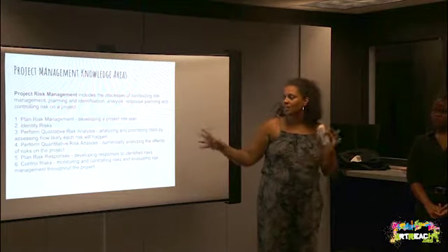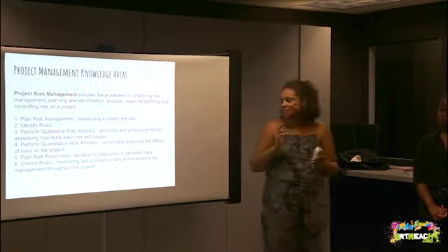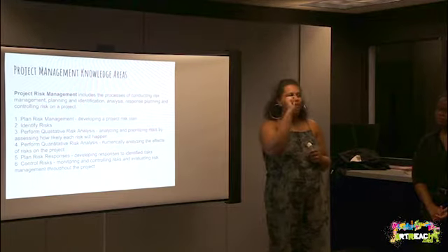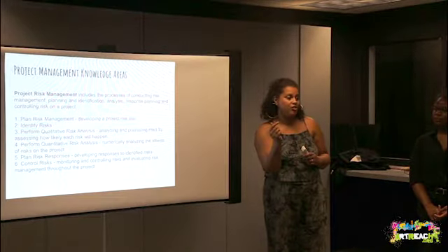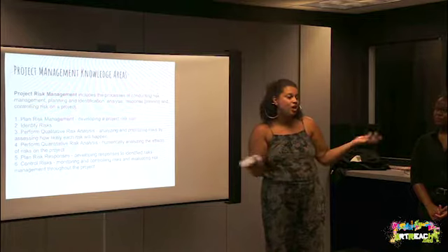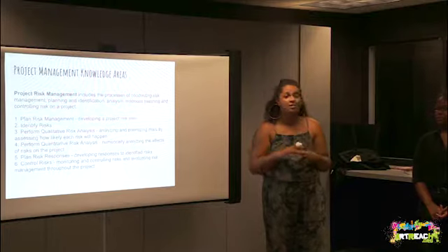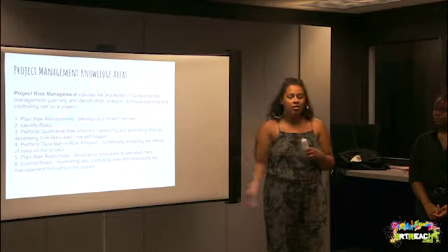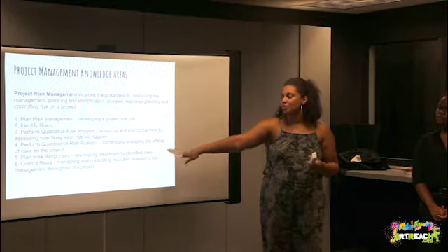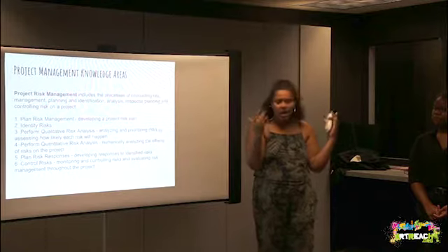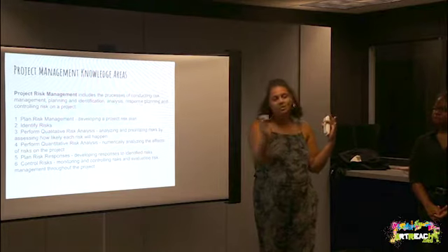You're going to perform quantitative risk analysis, and basically all that really means in plain English is that you're going to figure out numerically how that risk, if it happens, affects your budget. Somebody just drops out and they were going to do something for free, and now you have to actually hire somebody. There goes your cost because you didn't plan for that. Unless you do plan for that in your contingency, right? So that's an example of that. Plan risk responses. You're going to have a lovely little outline of each of those risks and how, if it happens, you're going to deal with it.